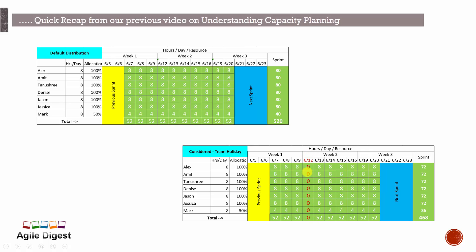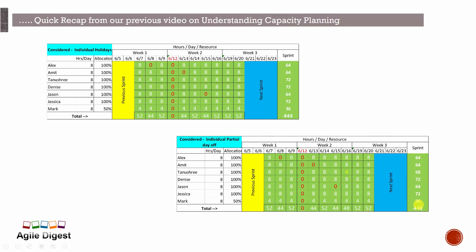For 50% allocation we mark that, okay, we have a company holiday or national holiday on 12th, so the total available capacity is 72 after calculating that. Then again we are seeing Alex is off on that day, Amit is on leave on that day, and Jason is on leave on this day. This is 15th, this is 13th, and this is 8th.